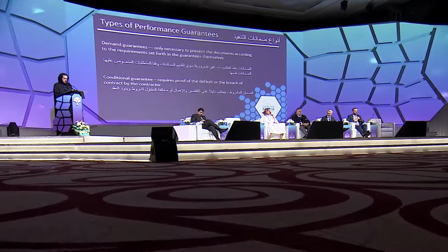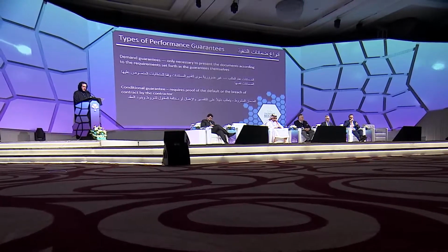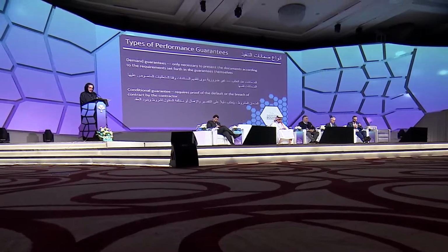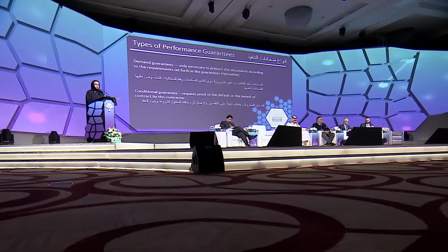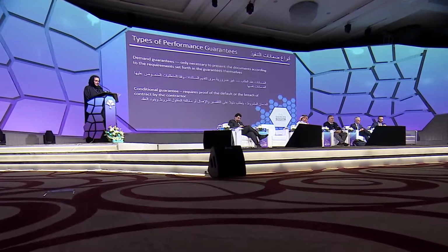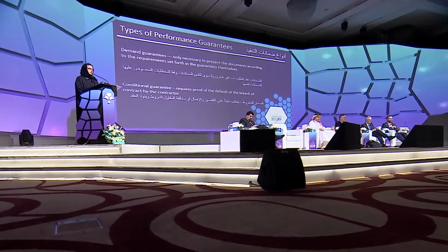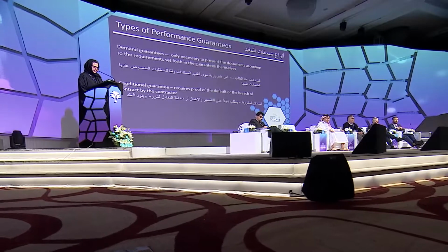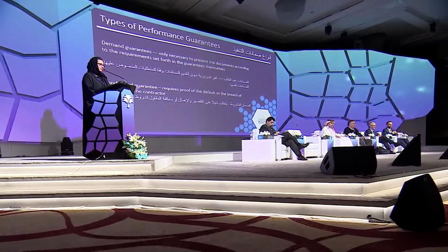The secondary obligation will ensure that if a party fails to perform a contractual obligation, if a third party fails to perform that obligation, or make payment owed to the beneficiary under the underlying contract, then the obligation of the guarantee issuer would kick in. Generally speaking, security instruments imposing a primary obligation are referred to as on-demand guarantees, and those specifying a secondary obligation are referred to as conditional guarantees.